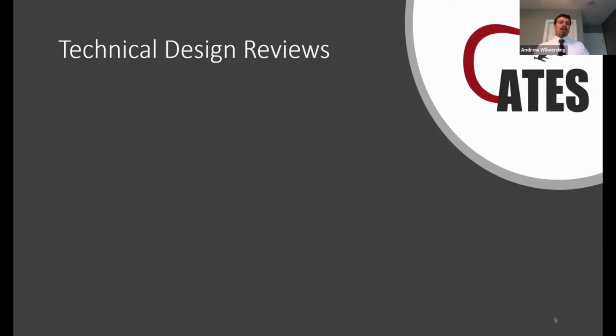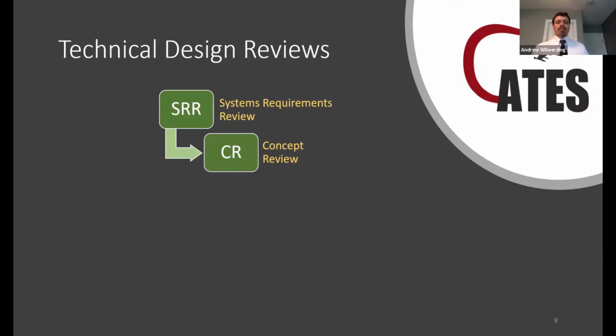So to keep us on track, we did a series of design reviews, starting with the systems requirements review. This is when we reviewed the requirements that we generated. The customer was there, as well as other technical representatives to look over our shoulder and just make sure that the requirements we produced would truly satisfy the need.